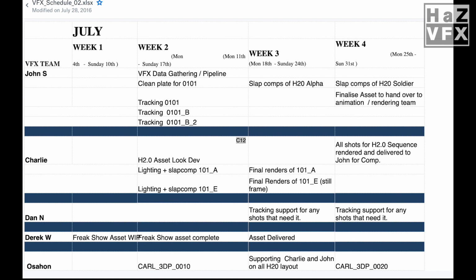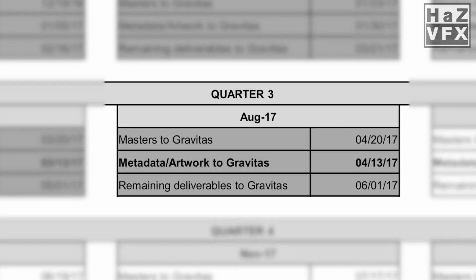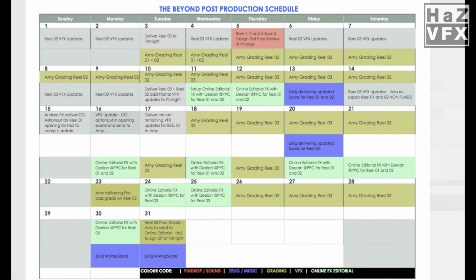Scheduling is also crucial during post-production and works hand in hand with the deliverables milestones set out from the distributor or key festival screenings you may have planned for the sale of the film. So once you have those dates locked in, it's really about working backwards from that date to ensure you have allocated enough time for post-production and visual effects, right through to things like quality control checks, which are all required as part of the post-process in order to deliver the film for distribution.